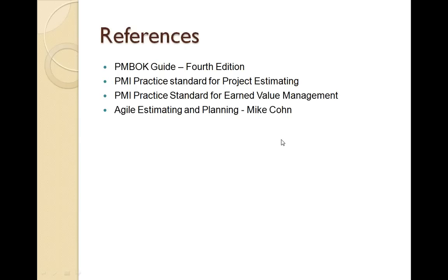Okay, the next example is a test case point estimate. So what we typically do is we create the use cases. Based on the use cases, we create the test cases. For the test cases, we can classify them into 3 areas, basically the complexity of the test cases, whether the test case is high complex, medium complex or low complex. And based on that, we arrive at a number.